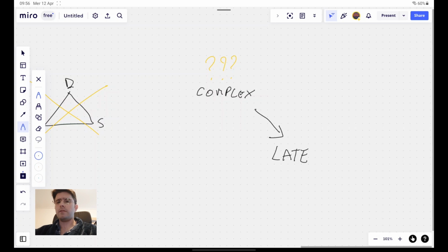Common sense tells us that if it's late and we cannot miss the deadline, then we should add more resources. But because software is immaterial, the only resource we can add is people. Again, software doesn't have a cost, and I already have access to all the software I need, so I can only add more people to it in the hope of meeting the deadline. People are expensive, but missing the deadline usually costs more, so we just do it.